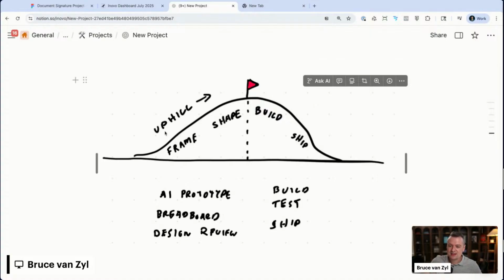Because what a lot of times happens, we take a little project requirements, we go straight to making tasks, we jump in, we start building it, and then we're somewhere in the downhill over here. And then all of a sudden, this clarity pops up, like, oh, the client thought we were going to do this, but actually the developers thought we were going to do that. And now there's friction and confusion. And at that point, we're through the budget. That's way more stressful. We're now going into extra hours. The deadline's not getting met. So you definitely want to surface these things as early as possible.